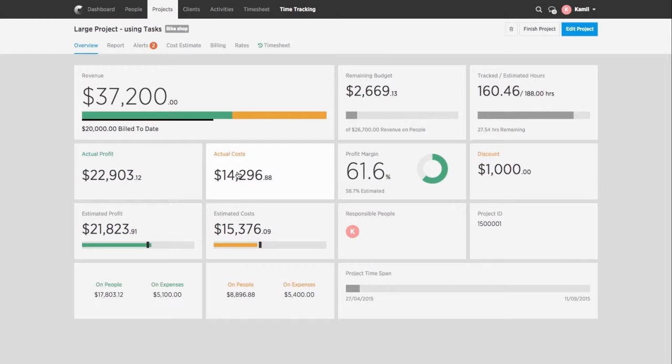The way it works is that you add people at the company to Cost Locker and indicate their monthly wage and hours. We automatically calculate the hourly cost per person, adding the budgeted overhead costs of your company, which you also add to Cost Locker. Then we multiply this number by worked hours, giving the current cost for the project and allowing us to calculate the project profit.